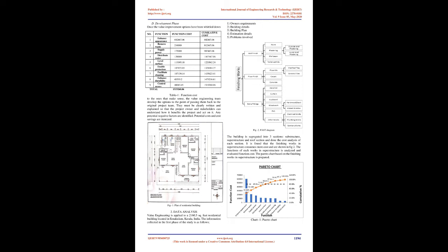C. Evaluation, analysis, phase. At this stage, a priority is given to each project improvement idea. The ideas are discussed and potential costs are determined. Once the risk-reward profile of each idea is itemized, the team has determined which ideas are worth implementing into the project or feature.